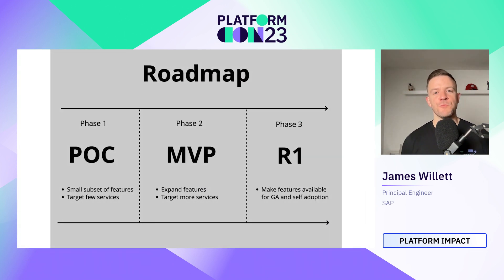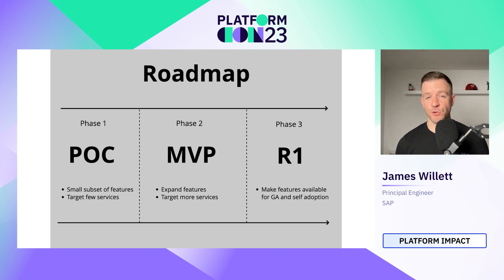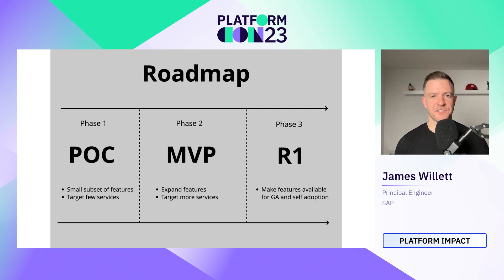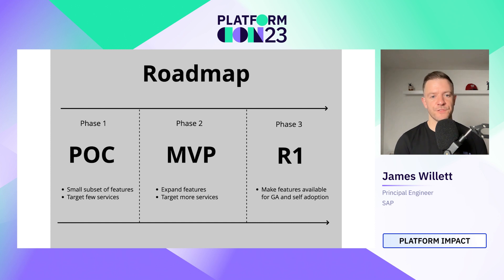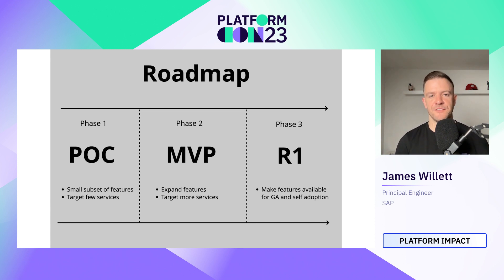From that, we built out our roadmap in three distinct stages. Phase one was a proof of concept where we chose a very small subset of features to implement initially, targeting only very specific services rather than opening up the platform to everyone straight away. Moving into phase two — our MVP phase — we expanded on the features, continuing to mature and develop what we implemented in the POC, and started targeting more services to onboard.